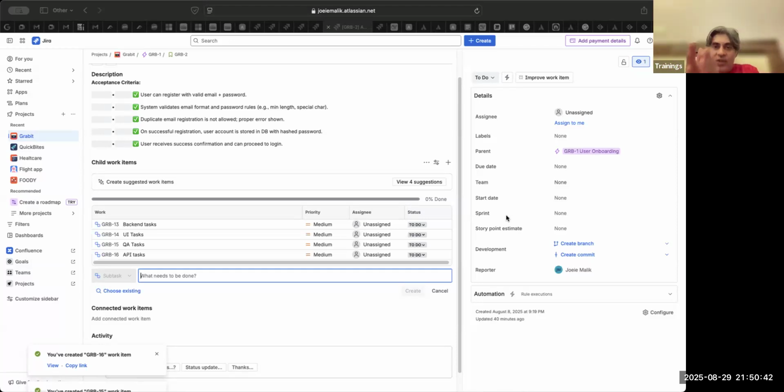So the point is, after the first round of estimation, there is a discussion. Then a second round of discussion happens. After that estimation also, people can disagree. And then there is a third round of estimation. Let us say in the third round there is still disagreement, and that can also happen. Then as a Scrum Master, you say, let us have a senior developer or an architect act as a tiebreaker. So if people are debating between a 5 and an 8, let us ask Venkatesh sir, he's a senior guy.